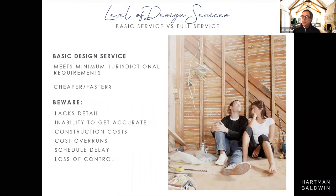And then what can happen is you'll get into the project and start to find these things. Like if you didn't figure out how that soffit is going to meet your cabinetry, someone is going to do that. And when someone is out there with 2x4s and a hammer in their hand, what do you think their motivation is going to be? To get this done, right? And so you may come home and go, gee, that's not the way that I pictured it. And you get a response like, well, there wasn't anything on the drawing, so that's just the way that I planned on building it. We can do it the way you want it, but then I'm going to have to take it out. I'm going to have to charge you more, right?